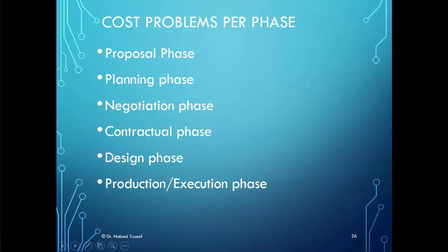During the negotiation phase, forcing a speedy compromise, procurement ceiling cost, and a negotiation team that must win this one by any means can cause a problem. In the contractual phase, there are contractual discrepancies during writing the contract, the statement of work different from the request for proposal requirements, and proposal team different from project team, and this causes a very major issue when the two teams are different.